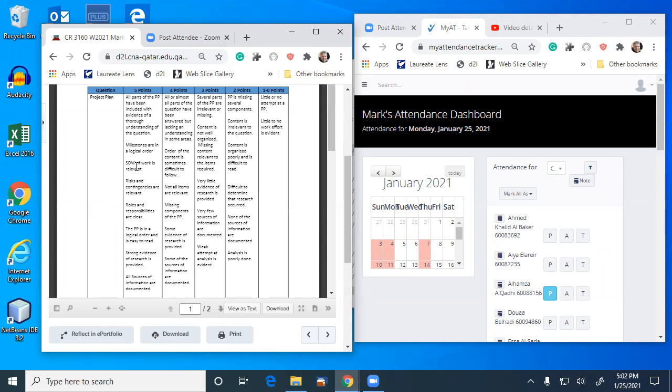Then the statement of work (SOW), or scope document. Basically, in this document you say, this is what we're doing in our project, but we're not doing those things. This is the boundary. This is all we're going to do. You state everything you do so that your project doesn't get bigger and you only do those things. Then roles and responsibilities, especially if you've got two people in your team: who's going to do what?